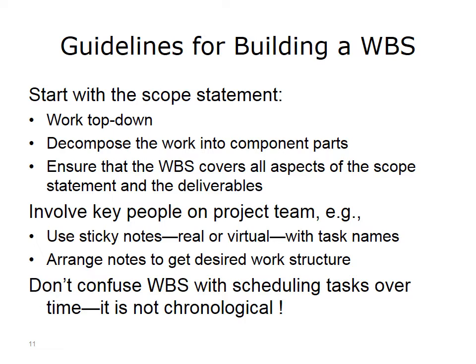Keep in mind that this work breakdown structure is not to be confused with an actual schedule of tasks over time. It's not meant to be chronological. The WBS is simply a way to take the total amount of work, starting with the scope statement, and decompose it into chunks that show the hierarchical relationships without showing the activities over time.